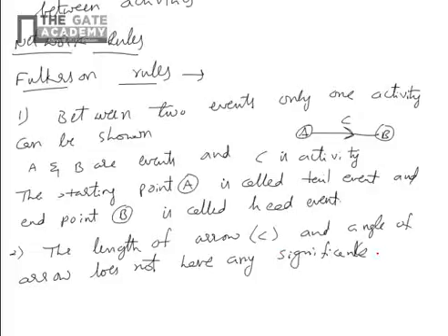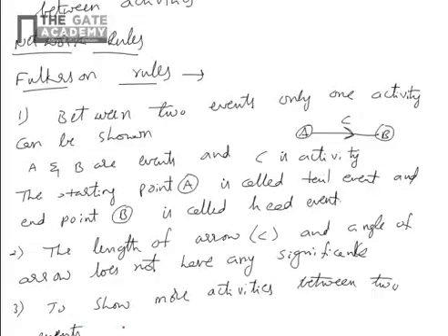If more than one activity is to be shown between two events, dummies have to be used.